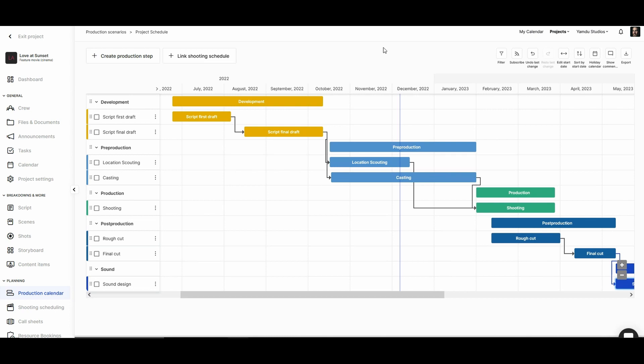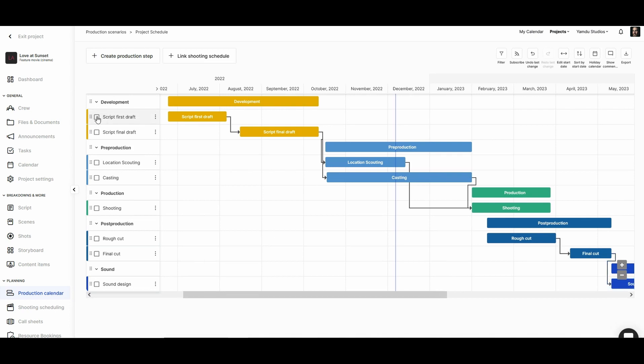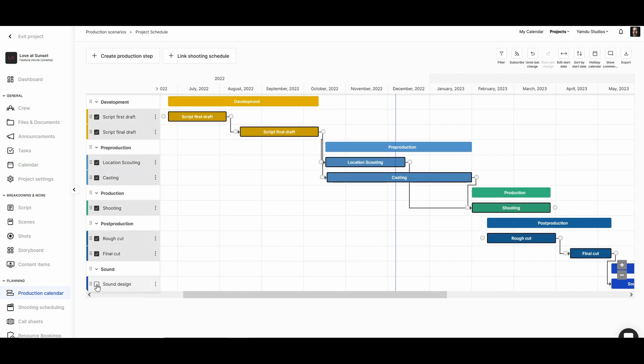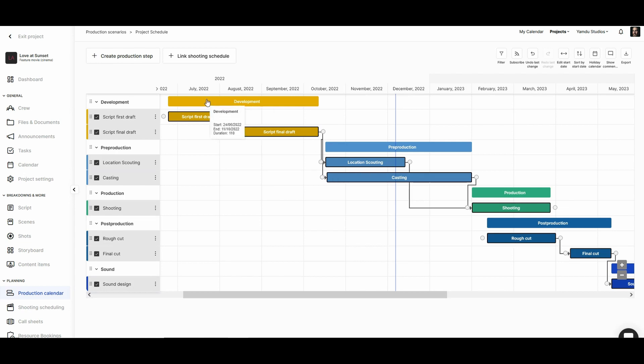But if we want to move multiple or all the steps at once, we just need to select a first step and hold the shift key, then select the final step. And when we do this, we'll be able to move everything at once while keeping the same structure.